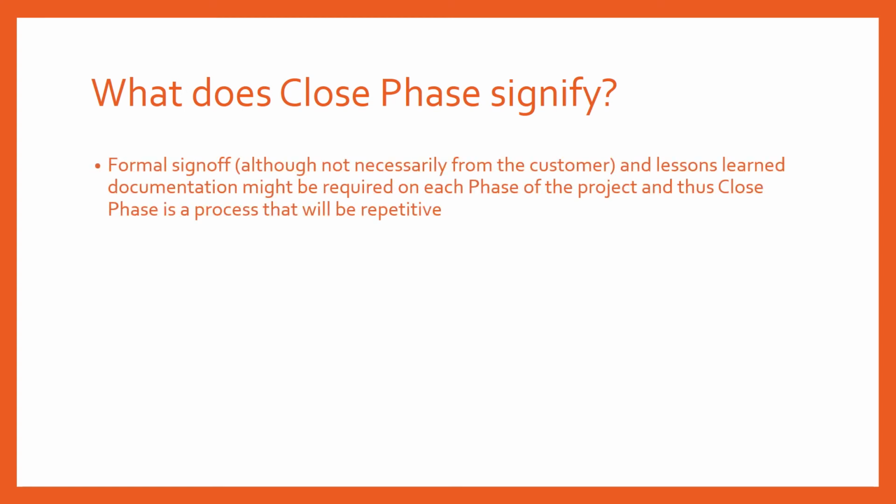Formal sign off, although not necessarily from the customer, and lessons learned documentation might be required on each phase of the project. And thus, close phase is a process that can be repetitive throughout your project, right? So, if the project team has decided that on each phase of the project, we will obtain a formal sign off from key stakeholders, it can include the customer as well.